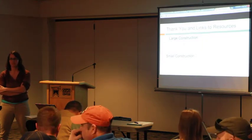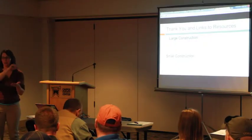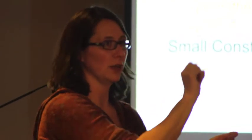So you just need to be very concise. If you changed your concrete washout pit from point A and put it at point C, you can just draw a line through your concrete washout pit, put "removed" and a date, and then draw your new one in. So it's really simple things like that.